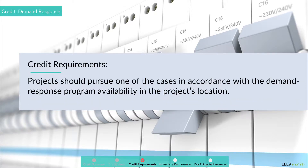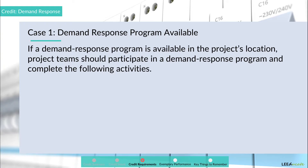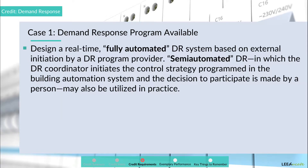Projects should pursue one of the cases in accordance with the demand response program availability in the project's location. Case 1: demand response program available. If a demand response program is available in the project's location, project teams should participate in a demand response program and complete the following activities. Activity 1: design a real-time, fully automated DR system based on external initiation by a DR program provider. Semi-automated DR, in which the DR coordinator initiates the control strategy programmed in the building automation system and the decision to participate is made by a person, may also be utilized in practice.